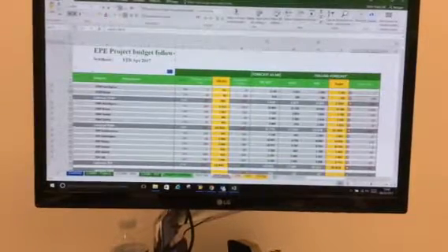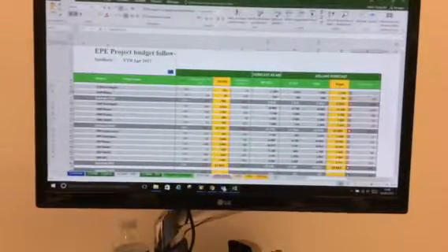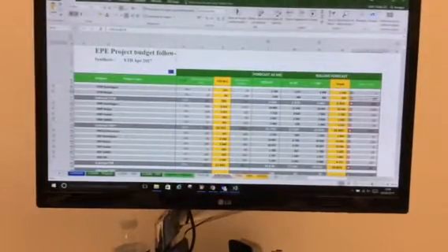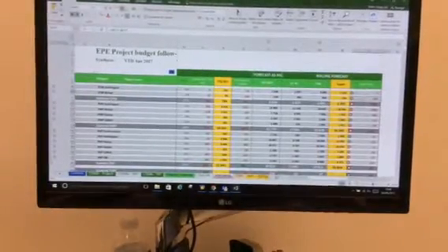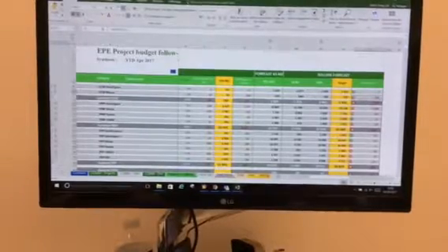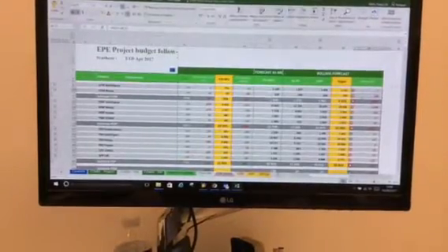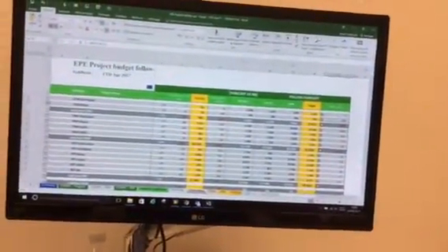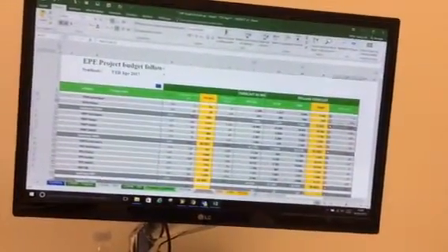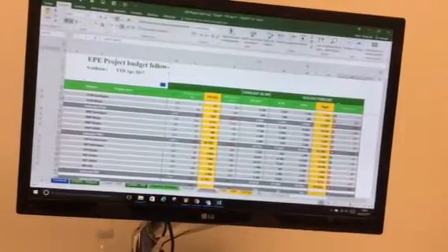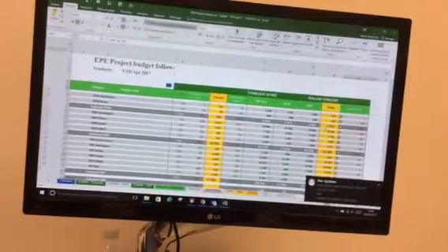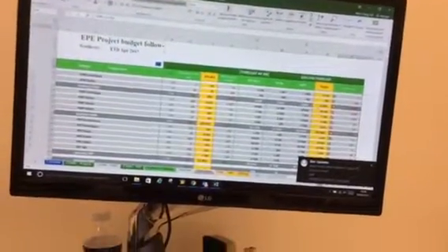FRF versus FRF. Actually, we have the targets which are given at the beginning of the year, and then every, let's say, quarter we have a review of the budget, that is what we call the RF, rolling forecast. So in this column we are comparing the forecast with the RF? In the columns, we calculate the gap between the full year forecast and the target. Got it.